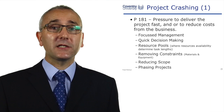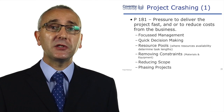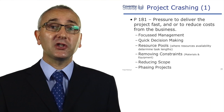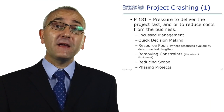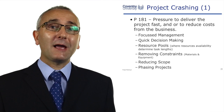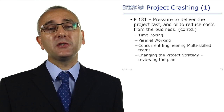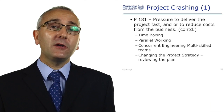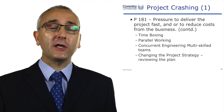Reduce the scope of your project. I would always suggest this would be the last thing that you would do because you're not delivering the functionality. But by deleting tasks, you are actually going to be able to do more in a given time. And phasing projects means overlapping whole projects with each other. Time boxing is very similar to the technique in agile project management, where instead of saying how long will it take, you're saying what can you achieve by Friday.